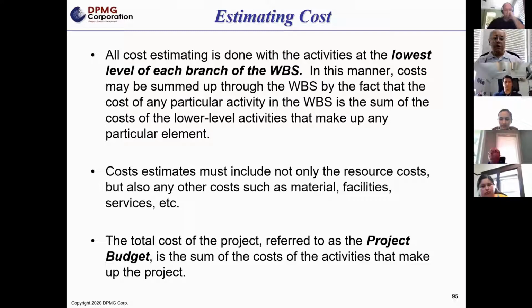What you need to do, and Ralph, in your group, when I dropped in on your team, you guys were having that discussion, is that you may have to break down your Post-it notes, the tasks or activities, a little bit further so you can actually estimate the actual hours. That's another thing to be conscious of as you go through this. This is why you will do some homework.